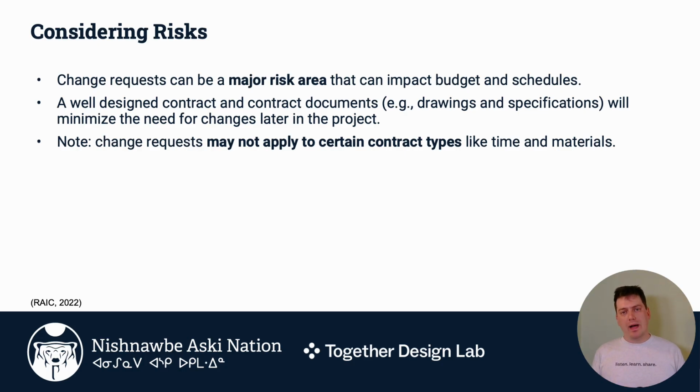So, while you can anticipate that all construction projects have some changes, because they don't happen in a lab where we can control all of the outside context, we should be clear that having really high quality or well-designed construction documents should minimize the risk for change. So, if you're starting to see more changes than you expect, it might be time to take a little pause and have a wider discussion with your contractor.